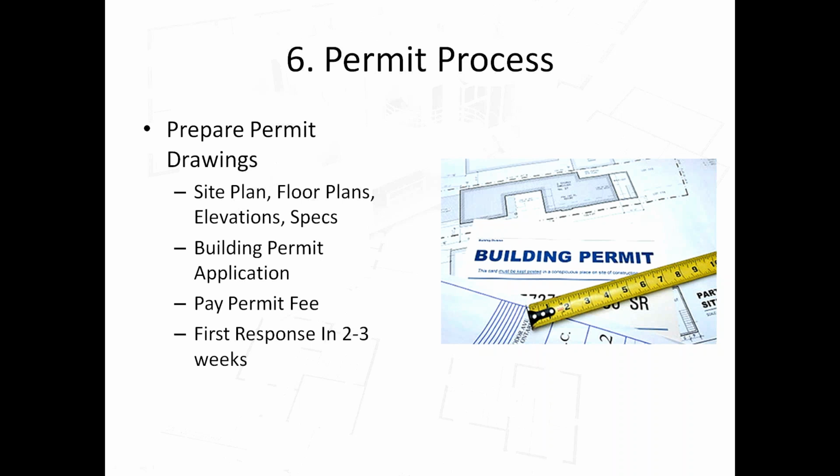Now, to produce a site plan, the gold standard is to have a land survey, okay? But it's often difficult to get a land survey. I always ask my clients to try to get a land survey from the seller, but I would say it only happens maybe 10% of the time. In other cases, the city might have a survey that you can use. And in a very worst case scenario, most of the time they've allowed us to use either the interactive maps online to give an approximation of where the property line is, or I'll go into the land registry, or the client will go into the land registry office and obtain the original lot survey for that particular subdivision.